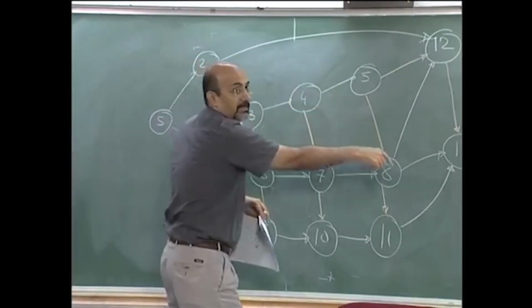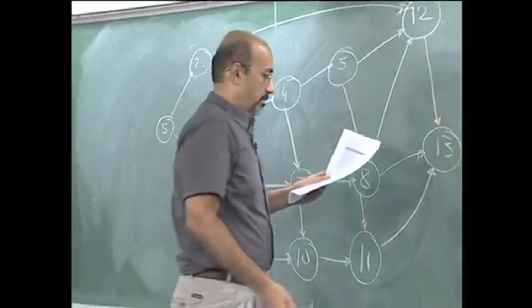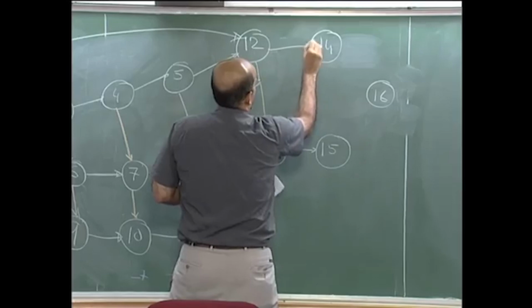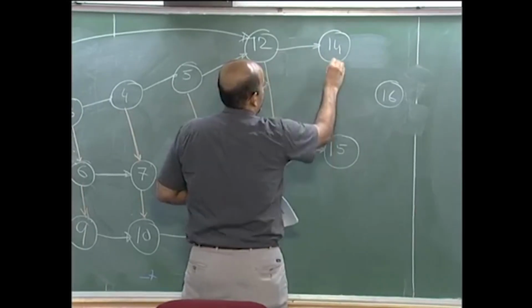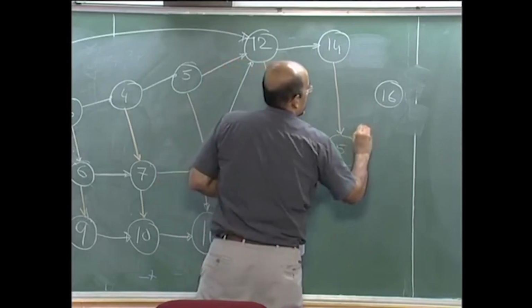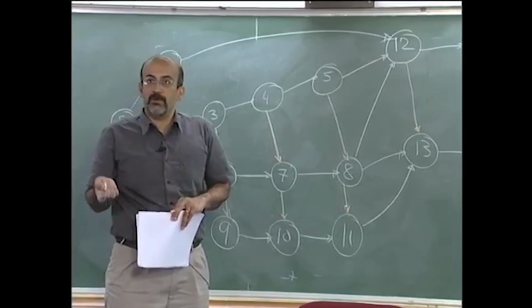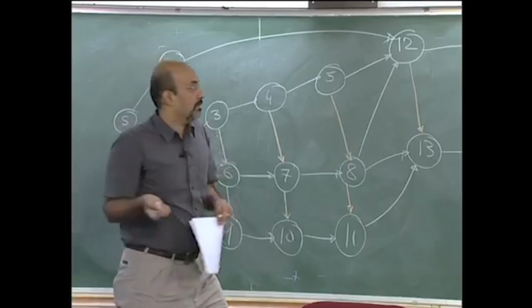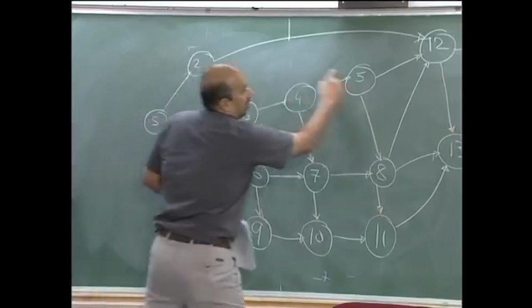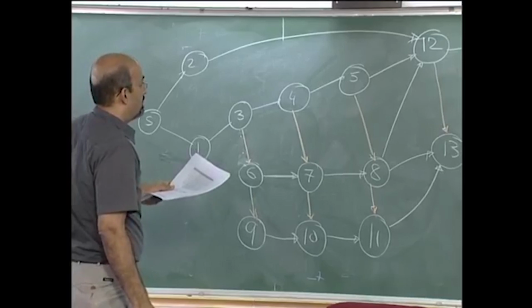Earlier we had a 2 to 13 relationship. Is it needed? Not needed this time. Okay. Now once I do this, I can place the deck slab, but I have only one crew. I have to place the deck slab on one side, release the crew, and only then can the deck slab be placed on the other side. I had a 14 to 16 relationship, not required again. Okay. So I have got rid of these redundant relationships. Okay, what about my 8 to 13?